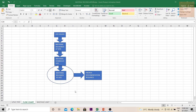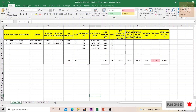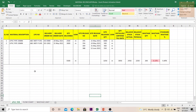After interacting with the store department, I found out how this could be solved. I instructed them to keep a record of whatever material is being released to site, so that at the end a proper record can be kept of what materials were delivered and what were released to site — and from these figures the wastage can be easily calculated. I prepared a format during that time which I still use whenever I am responsible for any project. I make it a point to talk to the storekeeper and instruct him to keep proper documentation.